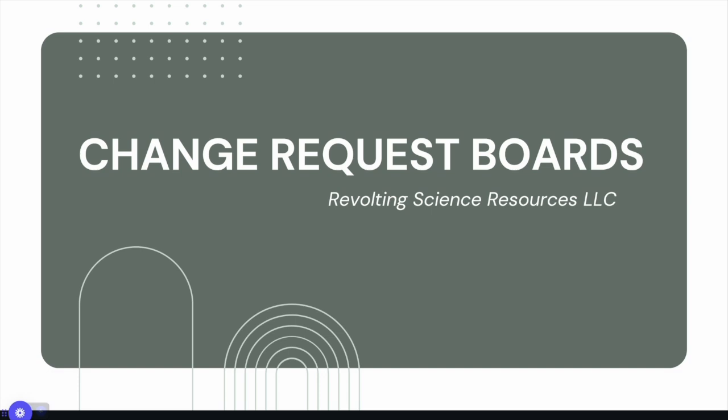accepted, rejected, or revisited. The purpose of change request boards is to document proposed major changes, the decisions reached, and the rationale behind them. This helps avoid repeating discussions and ensures intentionality in project changes. It also promotes buy-in from all involved parties, fostering a collaborative environment where everyone feels their opinions matter. Let's discuss how it works.